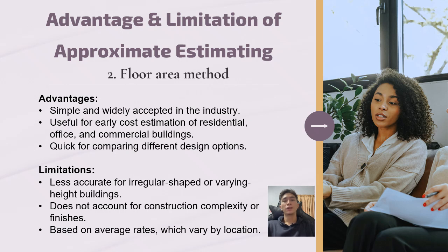The limitations are it becomes less accurate for irregular shape or multi-level buildings. It does not consider construction complexity or high-quality finishes. The cost per square meter is based on average rates, which vary depending on location and market condition.